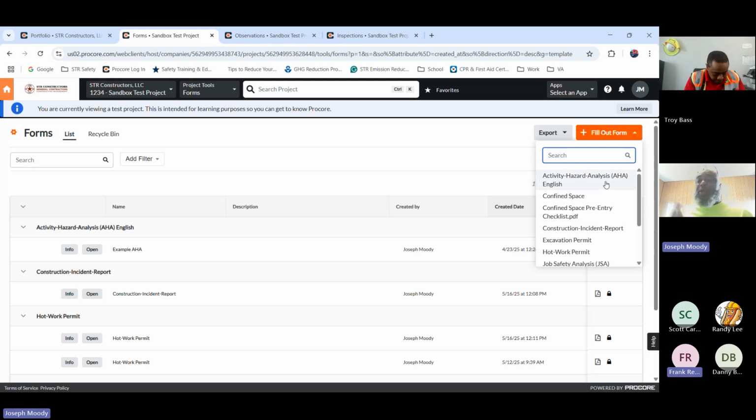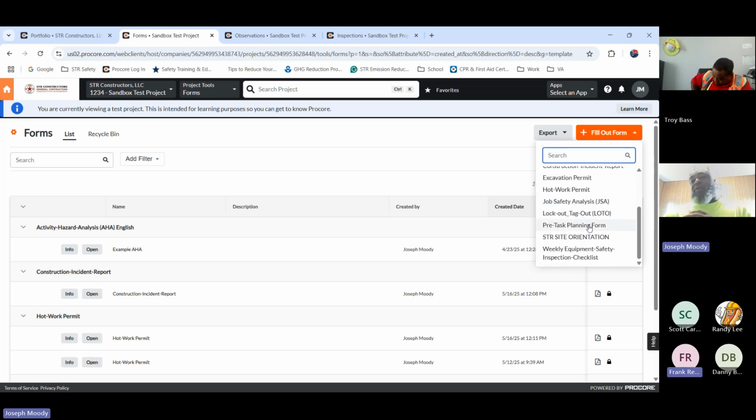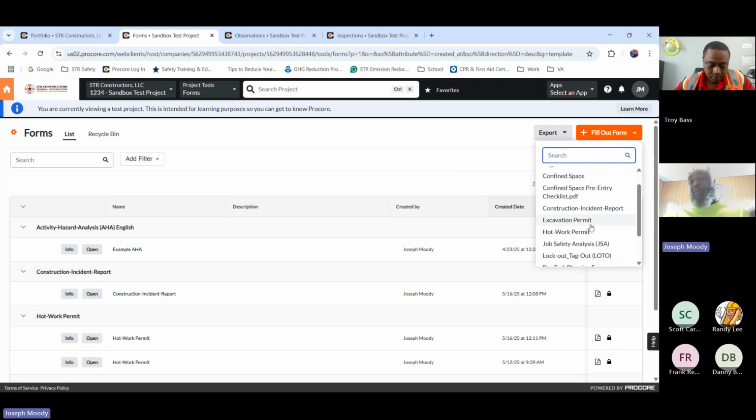So we're going to do things a little unorthodox here at STR because we are a GC and we don't really specialize in anything. Most of our work is subbed out. So in a perfect world, our subs will have a safety person who will get with the form, fill this out and submit their safety plan to us. But we know that these subs aren't going to do that because they aren't equipped to do this. So to circumvent that, we're just going to go straight PTPs, no JHAs, unless we have a project that requires us to do it. We're not going to do AHA.